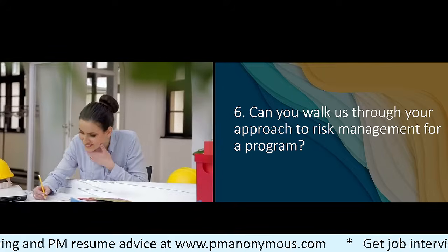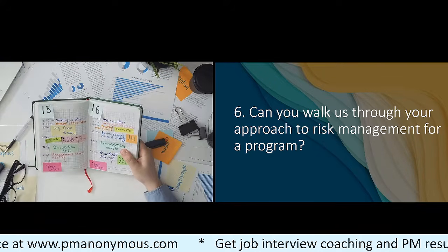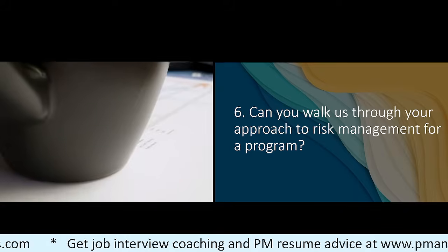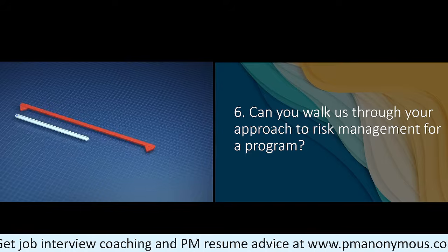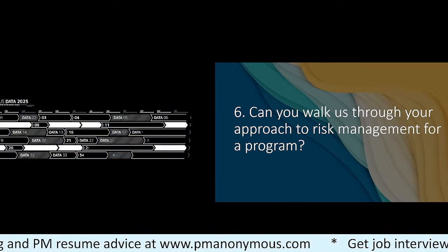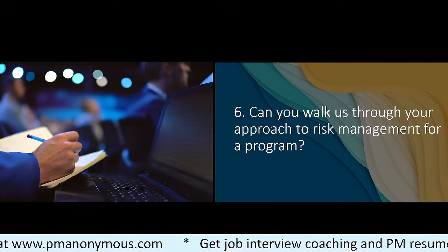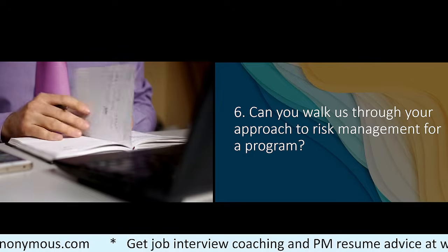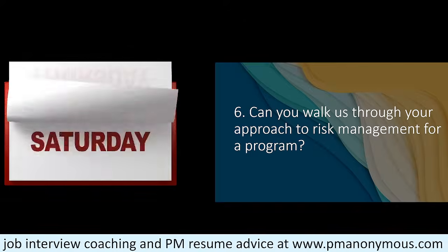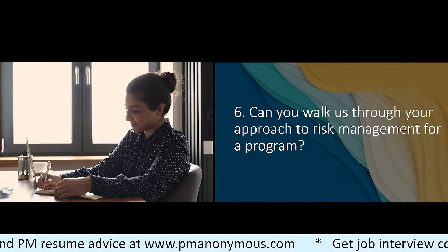We had a risk register that was well thought out. The formatting of the register was very meticulous, and the scale that was used to score qualitative and quantitative risks was decided upon, and that was used across the slew of projects within the program. When I've planned risk management, I then prioritize risks that have been discovered and identified by team members based on their likelihood and impact. I ensure that all project managers within the program use one template, one tool, one look for risk, so that we're comparing apples to apples.